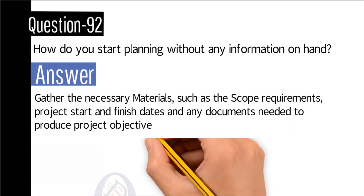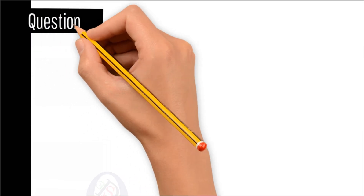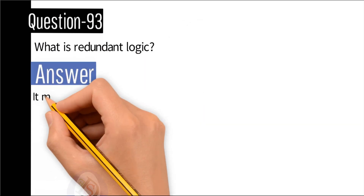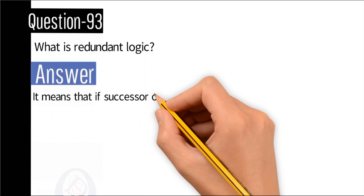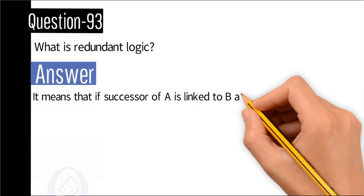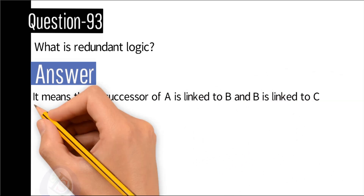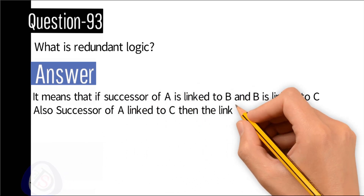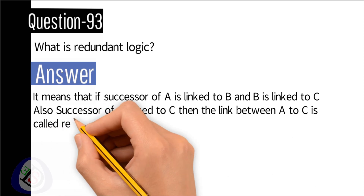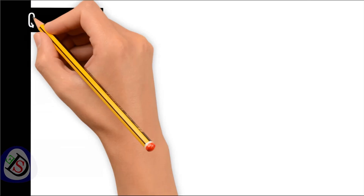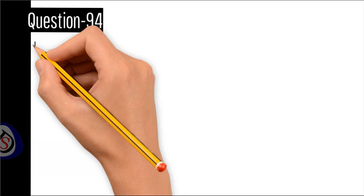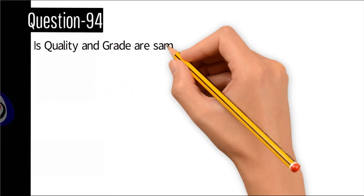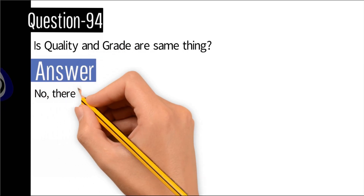Question number 93: What is redundant logic? Answer: It means that if a successor of activity A is linked to B, and B is linked to C, but also the successor of A is linked directly to C, then the link between A and C is called redundancy.